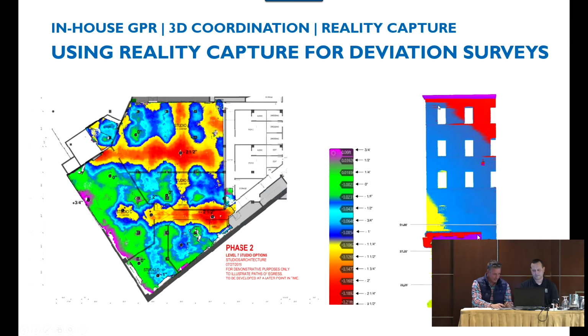But the biggest thing is down here, there was some underpinning and a new style of soil remediation. And it's coming into our foundation wall. So we were able to scan this and say, okay, guys, we're gonna have to chip this back a little bit. Just keep everything rolling. And we're probably, I would say, 2 or 3 months away from that point, but at least we have a game plan and we're moving forward.